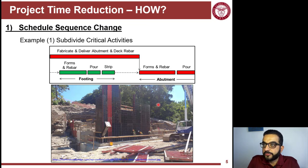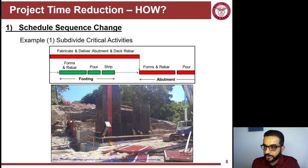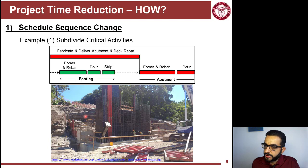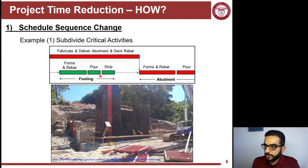The first approach is changing the schedule sequence. Consider this abutment example: you have a channel with a bridge or road on top, and you're building an abutment with a footing. Once the footing formwork, rebar, concrete pour, and formwork stripping are done, you work on the abutment wall itself. You fabricate and deliver the abutment deck rebar — that's the off-site work that happens before forming the abutment and installing the rebar as one activity.